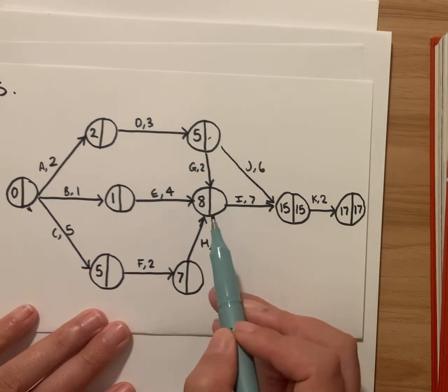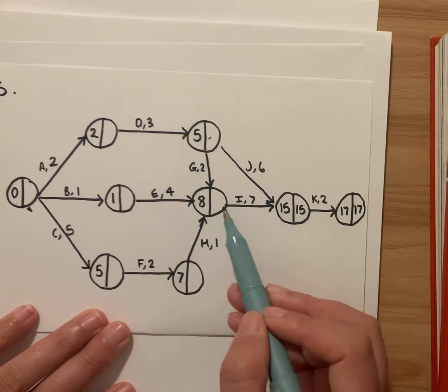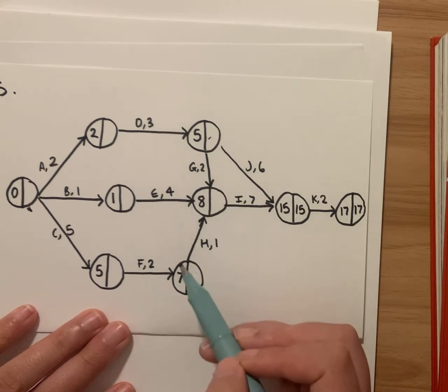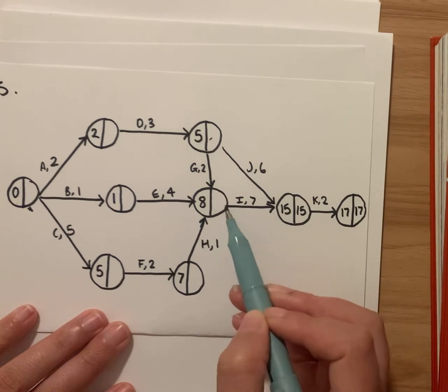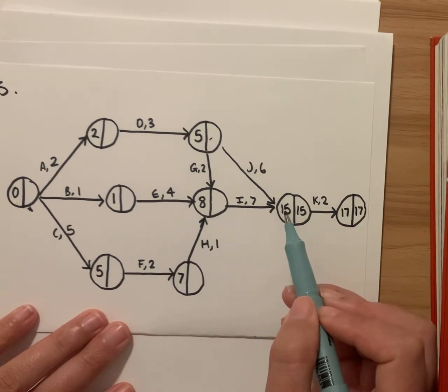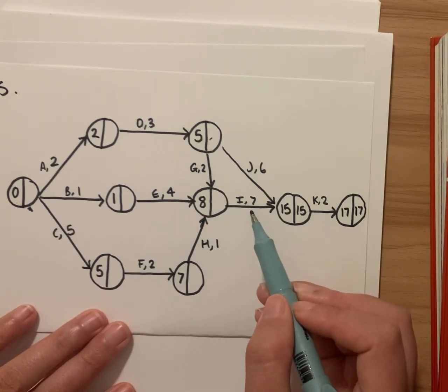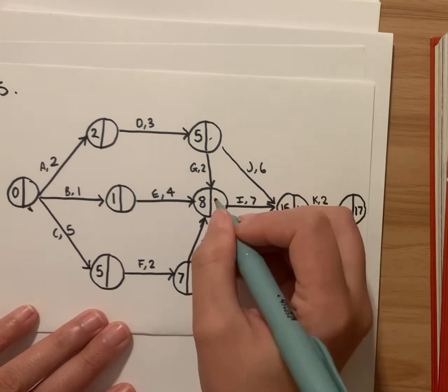Can we fill in this one? How many edges lead back here? Only 1, okay? Because these edges are going forward. We need the one that goes back along the arrow backwards. So this one is 15 minus 7. So that leaves us with 8.